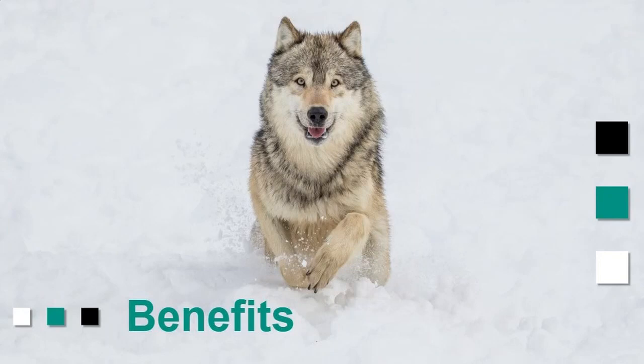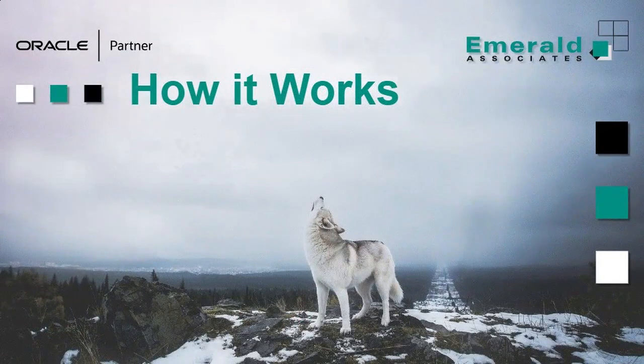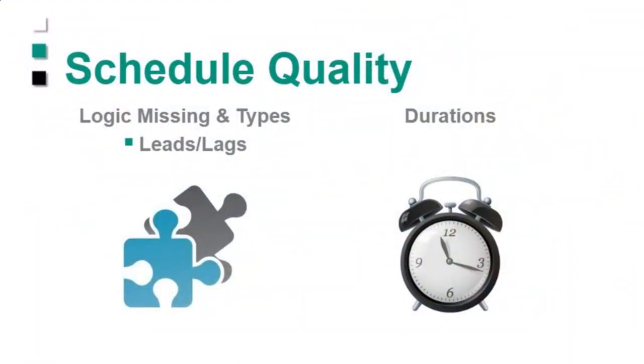So how does it work? The way that it works as a user of QA, all the data is sitting inside of P6. So we use out-of-the-box types of fields, codes, UDFs, to allow you to set up what you want to critique, to give you that comfort and that flexibility to set the criteria right inside the app, and then you see the results right inside the app.